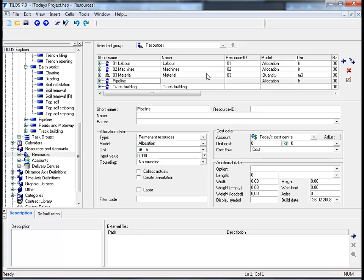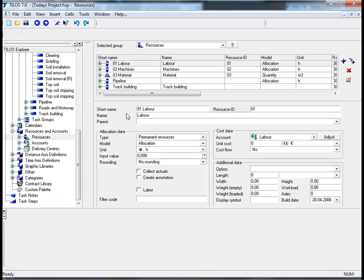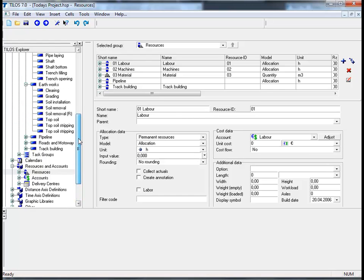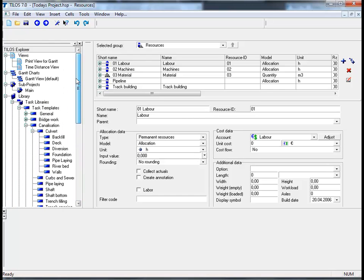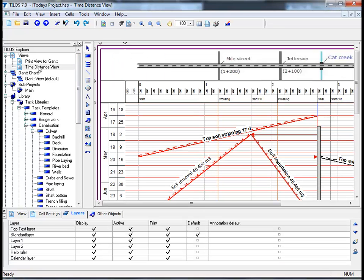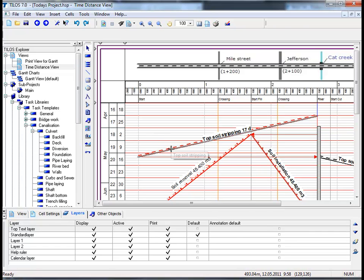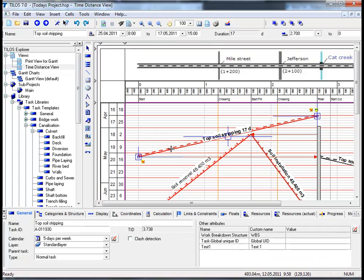Assign resources to tasks. In order to assign resources to tasks, we must return to our time distance view. By moving the scroll bar and dragging it upwards to the time distance view, please double-click, and in the main working area select the topsoil stripping task.